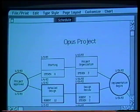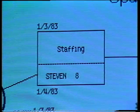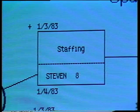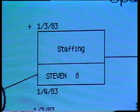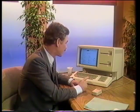The circles are milestones, and the boxes are the tasks to be completed. Inside each box is the name of the task, who's responsible for it, and how long it will take. I can also see two dates associated with each task and milestone — the latest I must start a task if it's to be completed on time, and the latest I have to complete the task if I'm not to delay the whole project. With LISA, I can update the structure of my chart using just the mouse.